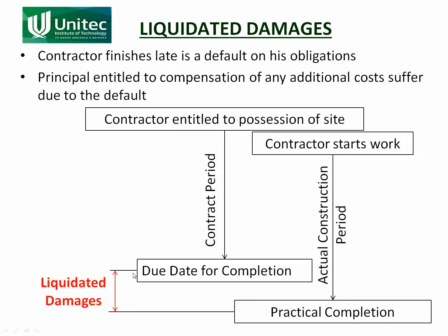The principal may well have incurred costs. If the project runs over by, say, a month, he has to keep the services of the engineer for another month and is still paying the engineer. It might be that he was going to tenant the building, so that extra month represents rent he won't receive. Or he may have loaned money to build the works, meaning he'll be paying interest for an extra month. So he will have incurred costs.